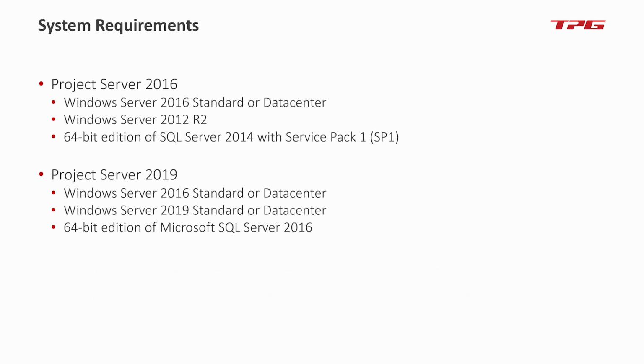So this really means maybe a bigger upgrade in terms of infrastructure. It's not enough if you think, oh, I just replace my Project Server. No. With Project Server, as we learned some slides before, comes SharePoint Server 2019, and SharePoint Server 2019 requires SQL Server 2016. Too many numbers now, I agree. Maybe too many details, but again, you get all the slides anyway after the meeting.